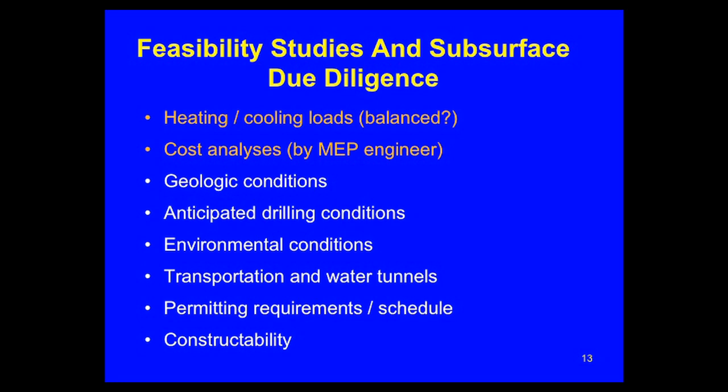While there may not be contamination on your property, someone across the street may have had a leaky underground storage tank for heating oil or something like that, and you might encounter contamination, and now you have to have an expense to deal with that.